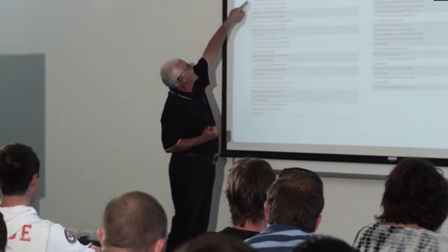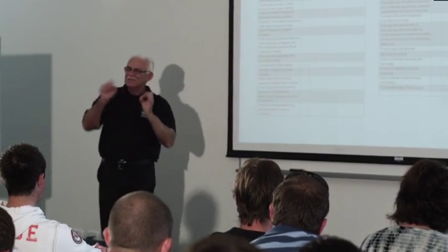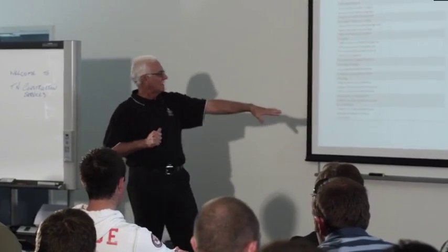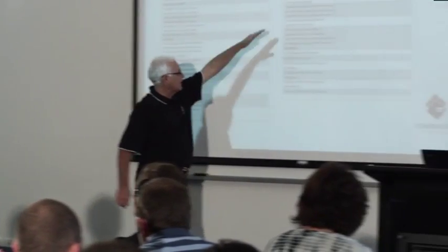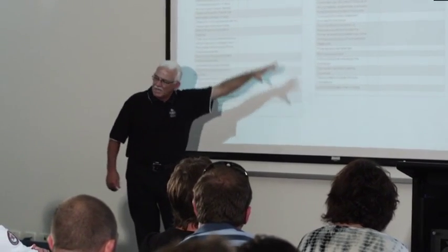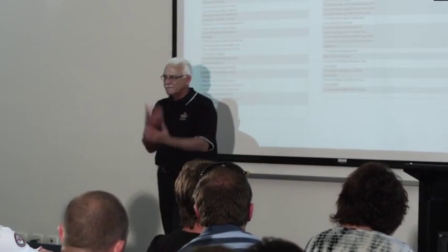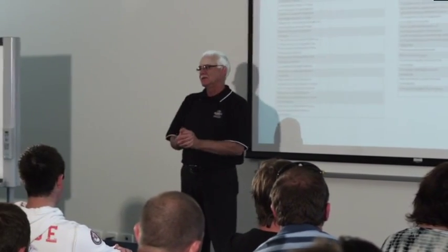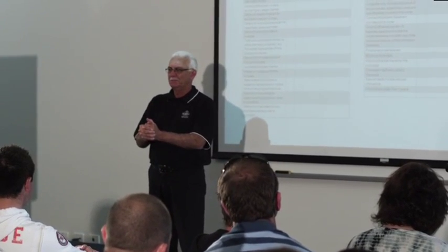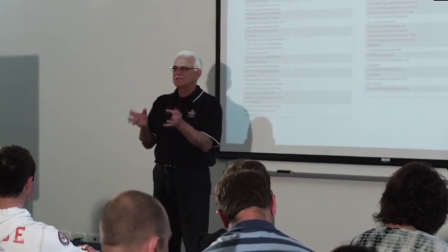Have I put a start date in there or have I put in a construction period? So it actually prompts you, and you go through all that and go, okay, have I got my, right down to the end, even to a safety plan. Right? Have I got all that? It's all part of your contractual obligations. When you've got through that, you go, yep, okay, I'm now ready to go and see the customer with my contract. All right? And the whole deal about this is risk management.